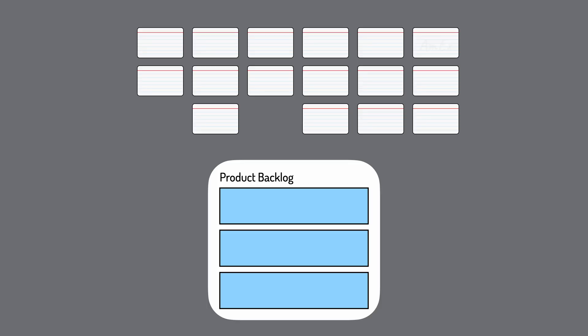First, any one card on a map can turn directly into a product backlog item. If we're building an app or site that collects payments, for example, we may have a card that says 'Pay with American Express card.' That's a product backlog item.